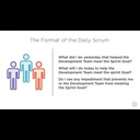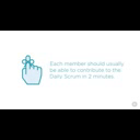Remember that our overall time box for this meeting is 15 minutes, and while we're not being timed individually, a good rule of thumb is that each person should be able to answer these questions in about 2 minutes. While this may seem tight at first, I expect that you'll each be surprised how much time it actually gives you. I also want to call your attention to the last question regarding impediments. This is arguably the most important question in the Daily Scrum because it encourages you to identify anything that may be keeping you from contributing at your full potential.